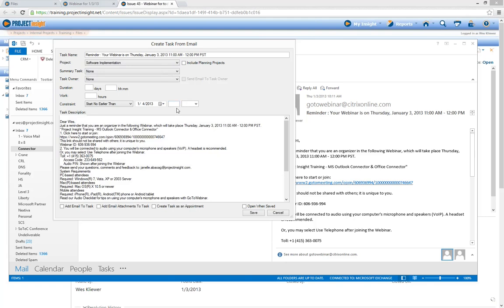The difference with a task is that we don't necessarily have all the abilities to set predecessors and successors, so oftentimes we actually default to having a constraint of a start date that you might want to implement into the project. This is a lesser used feature, but it can come in handy once again to add a task into a project.